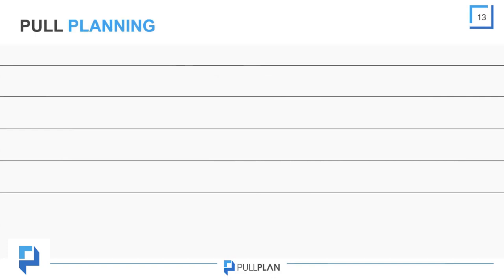To begin a pull planning session, we create an anchor milestone and pin it to the far right of the whiteboard. This is our final deliverable, which all predecessor tasks must support. We then have task owners create sticky notes that define all of the tasks required to be completed within the particular scope of work that is being pulled. Each task owner is responsible for creating their own sticky notes. Each task must be clearly defined and well delineated. Task scope shouldn't be fuzzy. Each task owner has their own color of sticky notes. This makes it very easy to discern who owns which task in the plan.